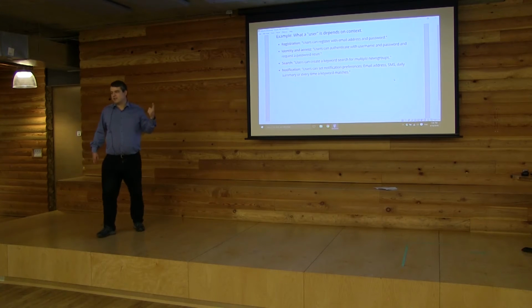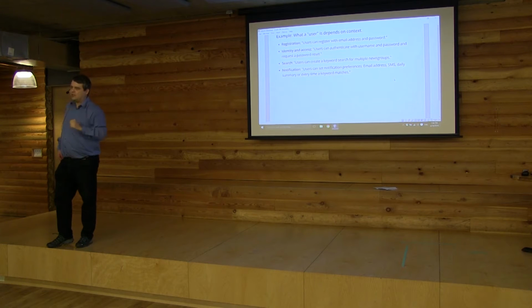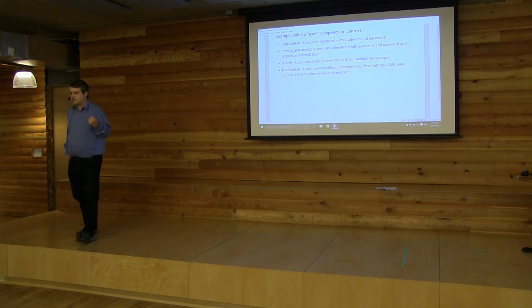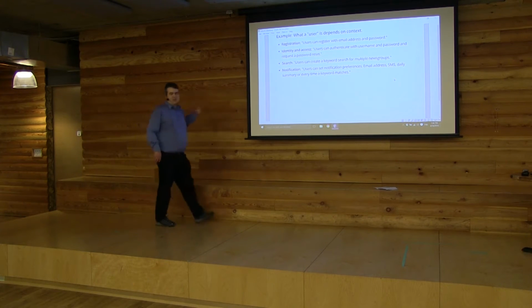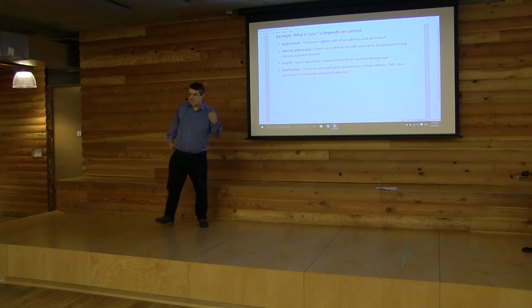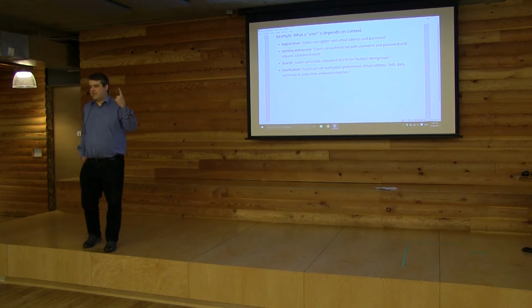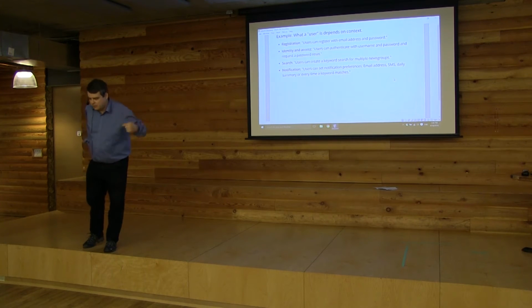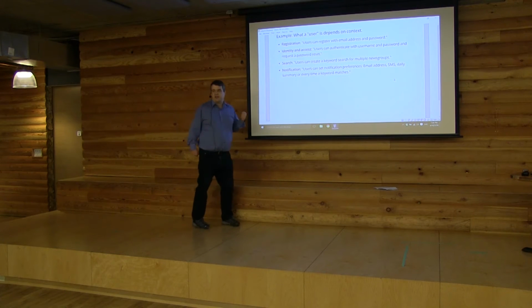Breaking down systems in such a way that the language within those contexts is consistent makes them easier to maintain. Eventually these turn into technical boundaries, so you get services which map to those linguistic boundaries. That's because it makes it less likely that you need to coordinate among people and project manage excessively due to communications disconnects.